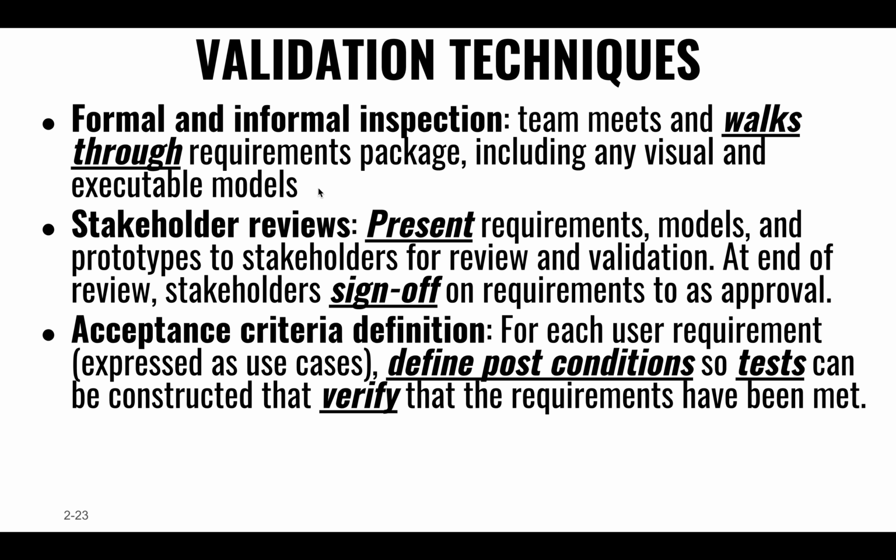So also the stakeholders need to provide us with a meaningful way for us to validate the criteria by which the stakeholder is going to accept the end product, right? So say we implemented a feature. Even before we start working on that feature, we write out what is called an acceptance criteria. So the end user is going to look at what I build, this feature. What are they going to expect, so that they're going to be happy and accept my implementation, right? So we write it out.